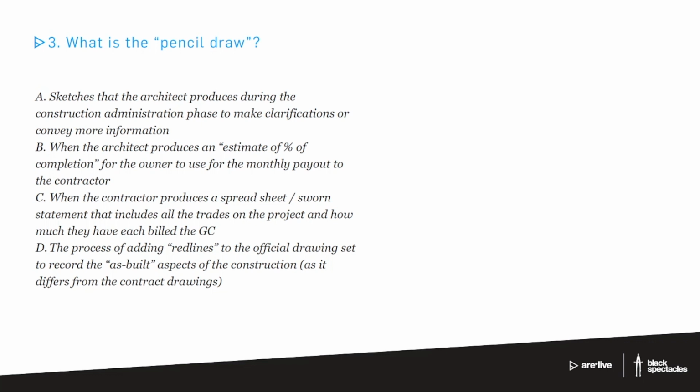So I'm just going to run through and get rid of a couple of these. D is definitely not it, though it's an interesting one, the idea of somebody keeping track of the as-builts. Typically that's the contractors as they go along, taking notes on the drawings. And also typically as an extra to the contract, as an additional service, you might take those as-built sketch pieces of information and develop it into a full set of drawings. Different situations would require that.